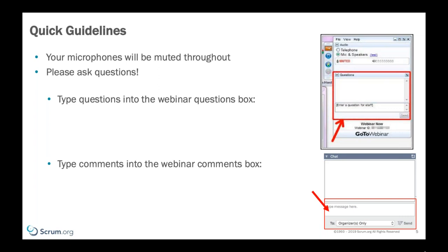So having clear sprint goals that allow us to understand what it is we're trying to achieve, and then getting the outcome of those sprint goals, so the working software we just created, in front of the users and the stakeholders at the sprint review, getting that feedback, interacting with those users and seeing whether what we've done makes them happy, benefits them, and then feeding back in that loop, I think is the thing that keeps us motivated, keeps us going. You know, we're doing something we enjoy, we're providing value to our stakeholders, people that are using our software, and we're doing good things. I think that is really important.